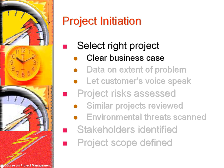To make sure that the right project is selected, the business case for the project must be clear. A return on investment should be calculated. It must be clear what problem is being addressed and why. There should be data supporting the existence and extent of the problem. For everyone to understand why they are undertaking the effort, there should be good data on both the extent and the importance of the problem.